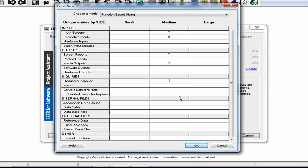I'll select one media output. In the request-response area I will enter three. Each screen will have some context-sensitive help available. We will also need new database tables — I'll assume two. And let's go ahead and enter a couple of new reference data tables for our pick lists. That's it — I've now sized my software estimate. I can click OK to continue.